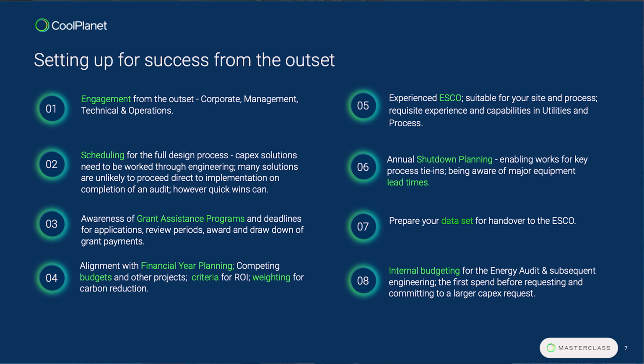A couple of other things more so around the financing, grant assistance programs. There's lots out there depending on which country you're based in, but getting applications in early, being conscious of when grant applications are due, when they'll be awarded, and how that ties in with your own availability of capex and cash flows during the project is also key to plan out. I'm assuming having the data behind those grant applications makes it much easier being able to verify it against potential savings, where we are actually going to achieve them and when they'll be achieved.